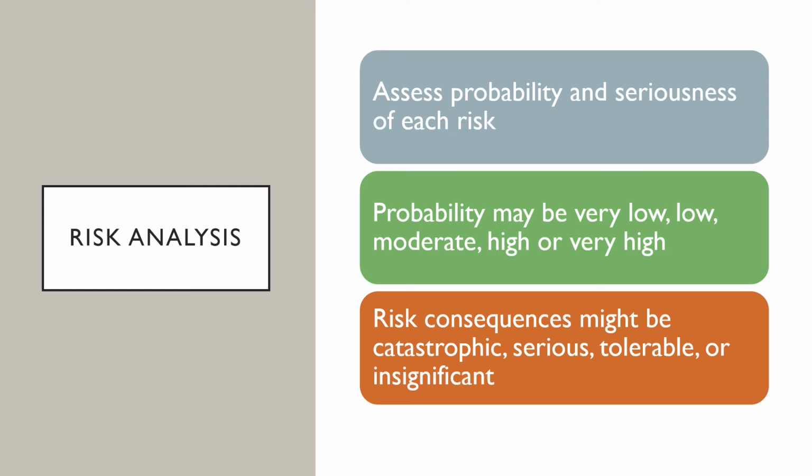During the risk analysis process, you have to consider each identified risk and make a judgment about the probability and seriousness of that risk. There is no easy way to do so. You have to rely on your judgment and experience of previous projects and the problems that arose in them. It is not possible to make a precise, numeric assessment of the probability and seriousness of each risk.